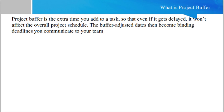What is basically a buffer in project management? A project buffer is the extra time you add to a task or project activities so that even if it gets delayed, it will not affect the overall project schedule. The buffer-adjusted dates then become binding deadlines you communicate to your team. That is the main concept of a project buffer.